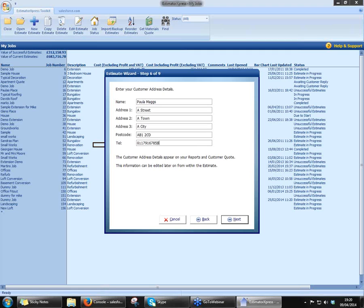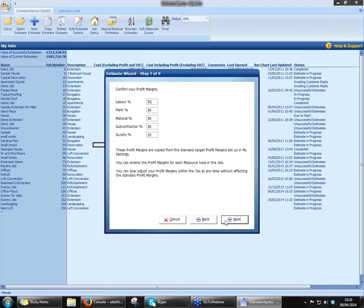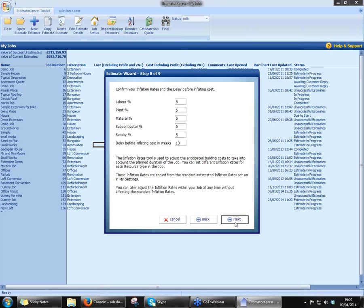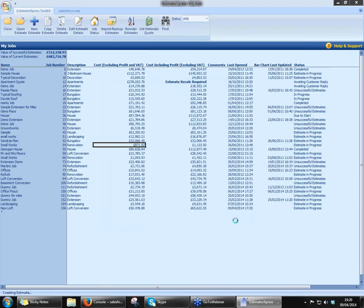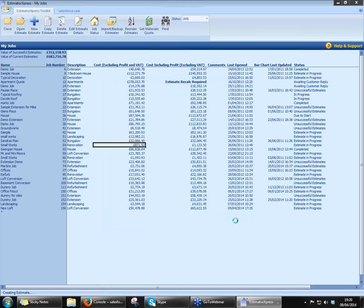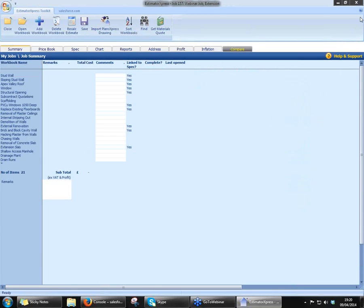Click on Next and pop the customer's details in. Now this is for the cover sheet when you produce the quote for the client. So I'm going to pop my details in because obviously I want you to see what the software kicks out in its full glory. Just bear with me one sec while I type all the usual nondescript stuff in there. Click on Next. Now you're setting up the profit for the individual job — you're setting your office at ABC Builders, thinking Paula's driving around in a Ferrari, she can afford to give me 35% on my labor. So you're setting that for this individual job you're on. It's not affecting the base rate you've got set for the entire piece of software — that will stay at the 30% we set at the beginning.